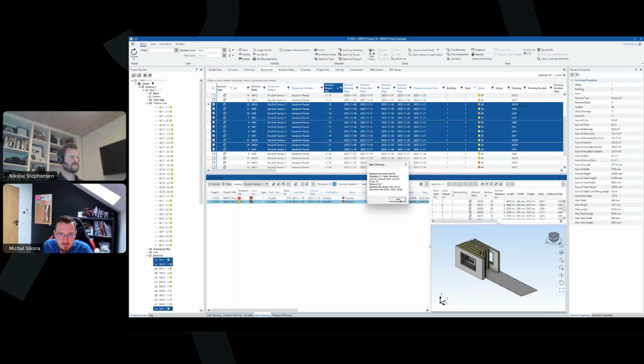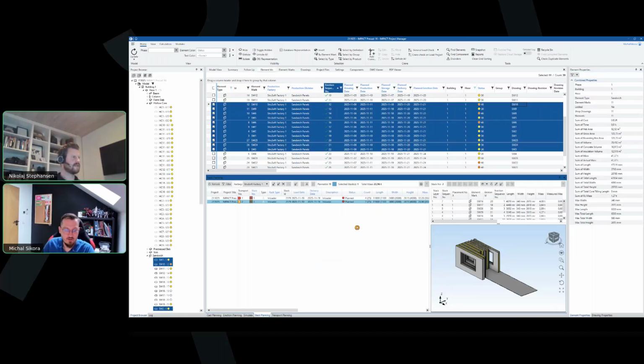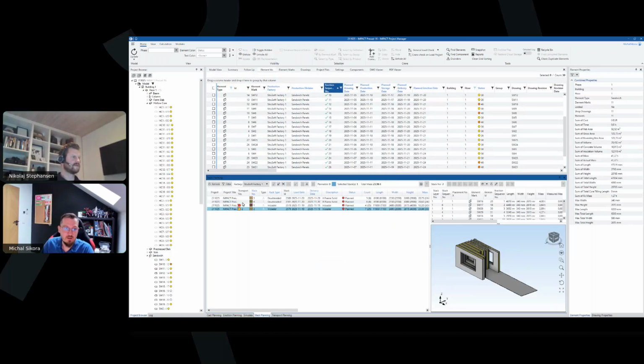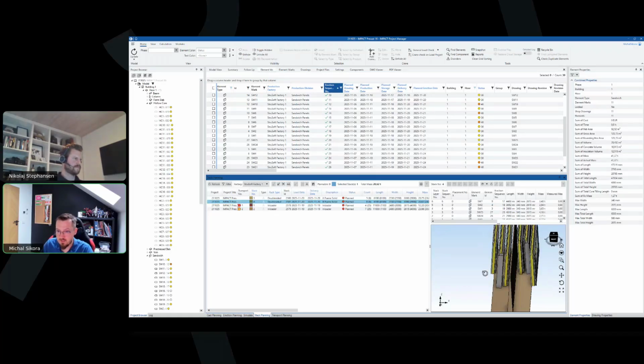Let's create that. Element size does not fit. See, I don't know the exact settings. Maybe some elements are too big. And it seems like one of our walls is way too big. It's 6 meters long, and in our factory we only have an 8-meter A-frame as well. But an A-frame that's specified for solid walls might do something like this. So it might be just too big.